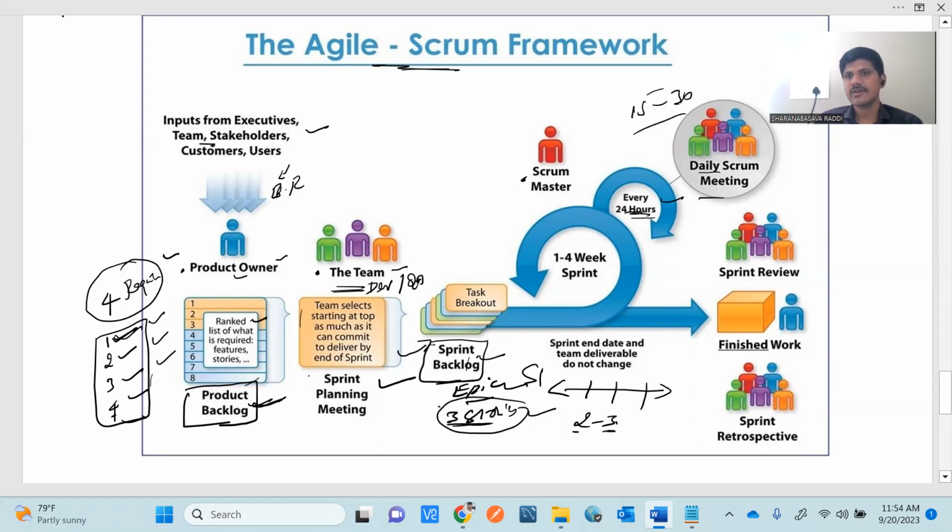Okay, here each and every person from the scrum team, meaning the development team and testing team, should be able to give their updates to the scrum master or the whole team. What the specific QA or development person did yesterday, what the plan is for today, and if there are any blockers while doing their work, that should be communicated or called out in this meeting. This is a very quick stand up. It will run for 15 to 30 minutes.